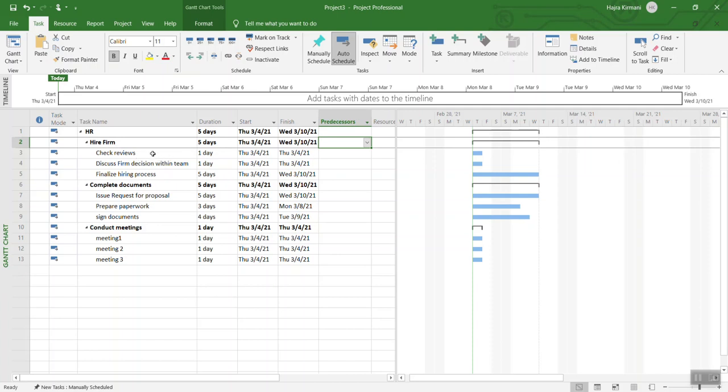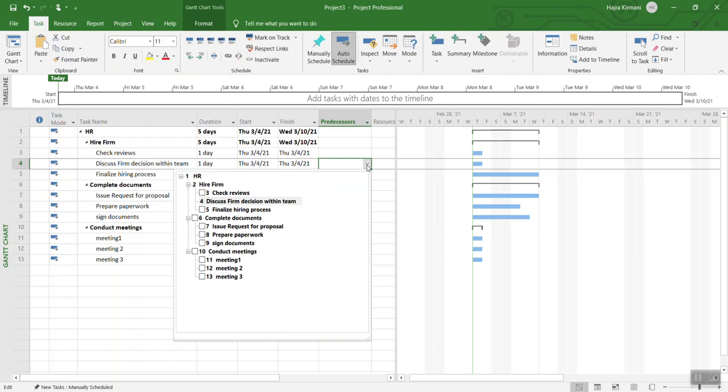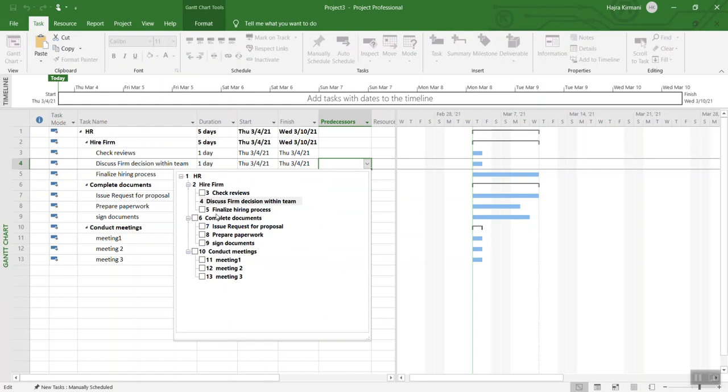For example, if you look at check reviews before hiring the organization, discuss firm decision - you cannot discuss the decision unless you check the reviews and make a decision to hire the firm. You are going to put your cursor over here, which is item number four. This is Microsoft Project 2019, by the way. If you have a drop down, you can see all the items and you can do the check box.